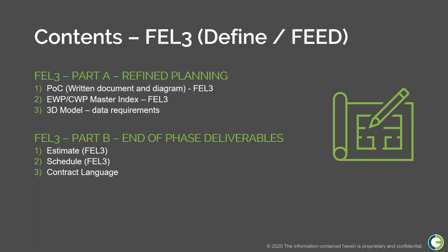The trick and the biggest importance with FEL3 with the path of construction is finalize it and lock it in. And after that, it needs to become much like design development and quantity changes. You shouldn't be doing that after FEL3 in any sort of meaningful way. You shouldn't be adding a piece of equipment to your design after FEL3. So you need to treat the path of construction with that same locked-in rigor.